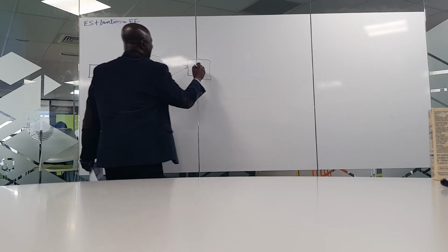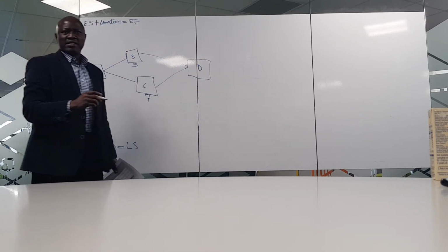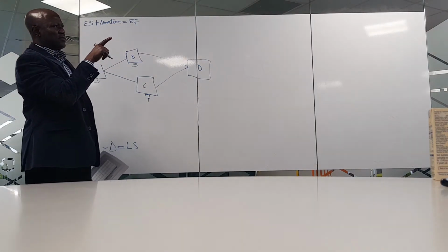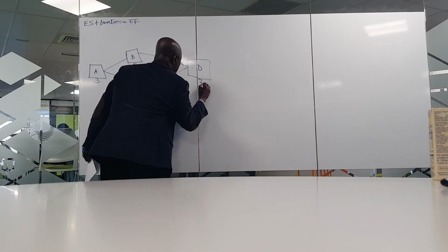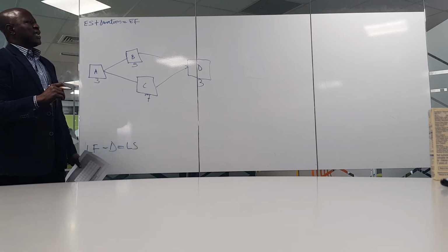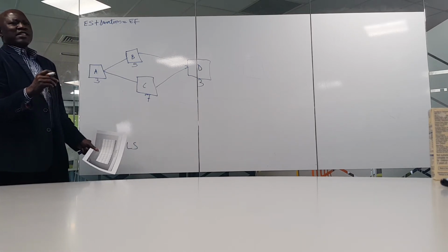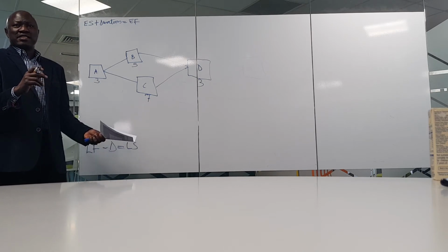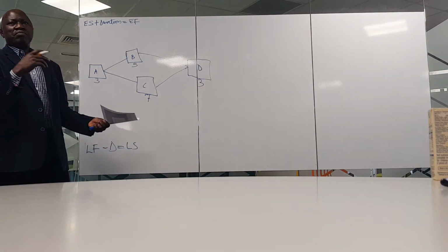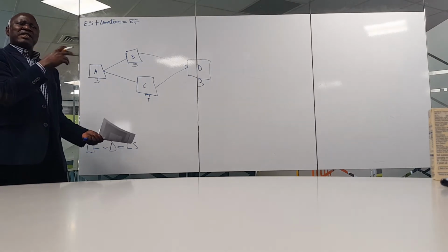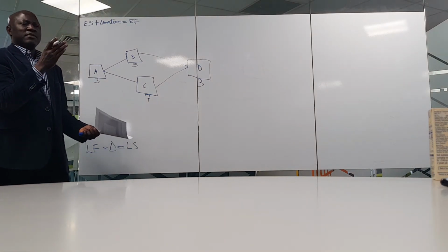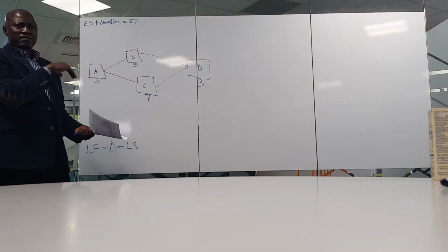So we label this, am I right? This. How many days? 3 days. Thank you. Don't forget to put your 3 days. Now, after that, we have activity E. Activity E we can't start until B is completed, meaning that activity E is dependent on activity B.